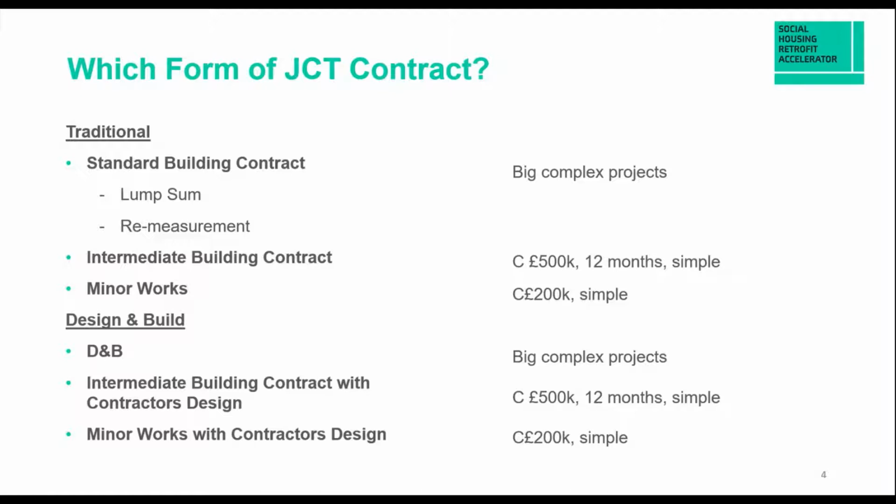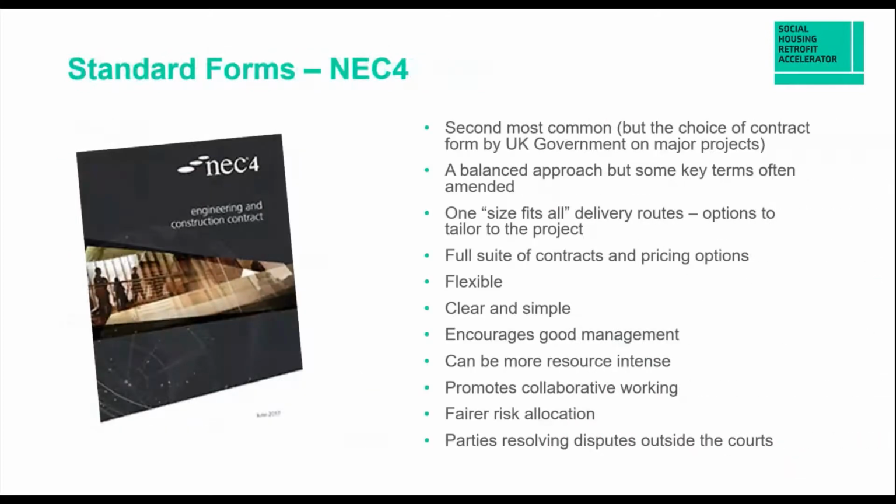So moving on then to the NEC suite of contracts, if we could move on to the next slide, please, Andy. Perfect. So NEC is the second most common choice of contract, but actually the first and foremost choice of contract for the UK government on major projects. It does have a balanced approach generally, but some key terms are often amended.